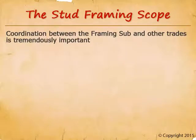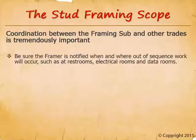There are many trades that intersect the framing work — anything recessed in, mounted on, or passing through a stud wall needs to be coordinated with the framing subcontractor. Be sure framing bidders are notified when and where out-of-sequence work will occur, such as at restrooms and data rooms. These rooms are on the critical path of the schedule, so framing subs must jump around the site to frame, rock, and tape isolated rooms, which has an inefficiency cost.